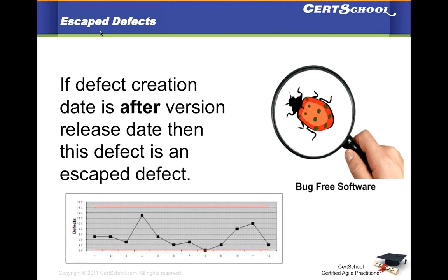In Agile, if this defect is found, that is by definition an escape defect, it reflects badly on the whole team, also the QA, in the sense that it should have been caught early on. In this definition we are using release date as our line, after which a defect will be termed as escape defect.